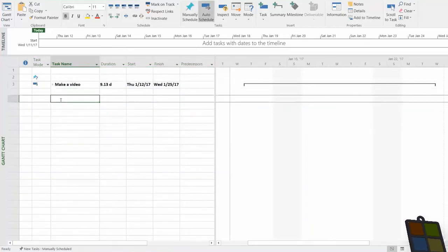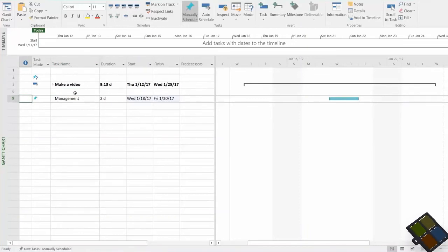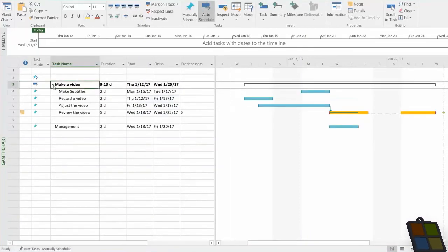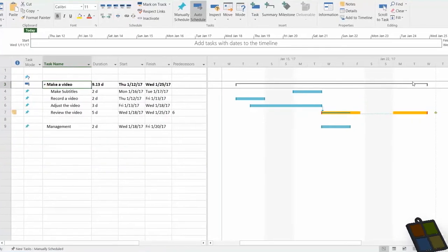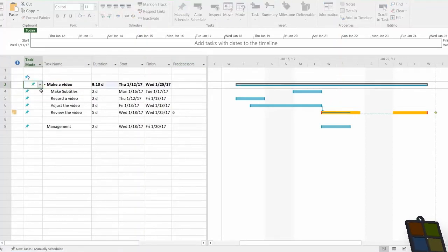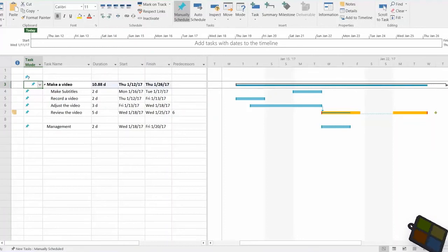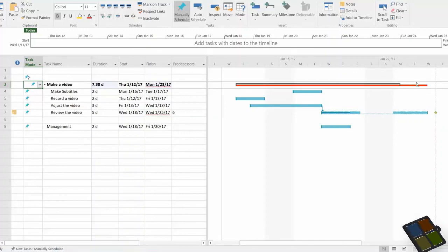Close the summary to add new tasks outside of it. In the Gantt chart, the summary is a simple container, long enough to contain the earliest start and the latest finish date of all its tasks. Just in case the summary is defined as manually scheduled, you are able to modify its duration directly. Just include all the relevant tasks in the time, or it will show errors indicated by a red-colored bar.